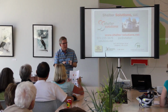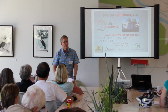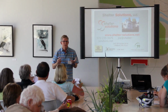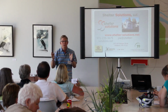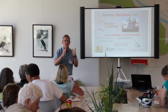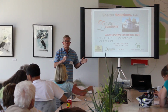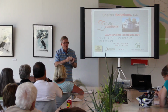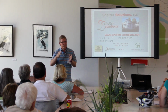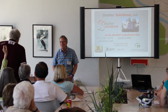800 square foot will come down towards 140, 135 per square foot. Most of my 800 square foot ones, depending on the configuration, are going to be from 110 to 120,000 in that range. And then small ones, I just did a 350 square foot one, was around 65,000. And so they'll range from there to 100, depending on whether 6, 7, 800 square feet. Hope that answers it. That's the best I can do.